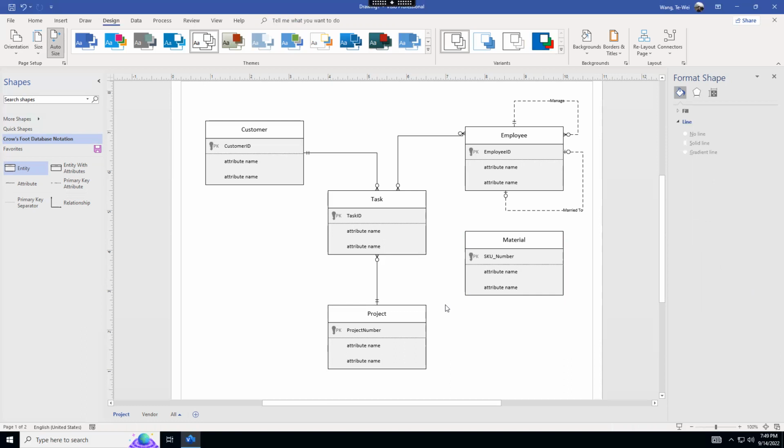The carpet, the glue, the paint, put together as material. So every job might have multiple materials. Material is related to task. It's also related to project, but it's better to attach it to task, because every little task within a project uses a certain set of materials, which is different from the entire project. If you manage all the materials used for every task, you will have the entire material for the project. So even though material is related to these two, we attach it to the task, right?